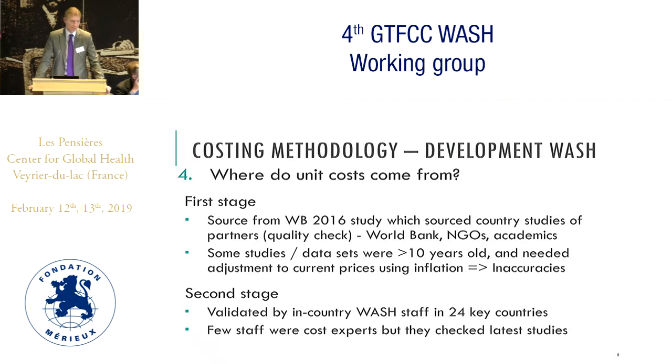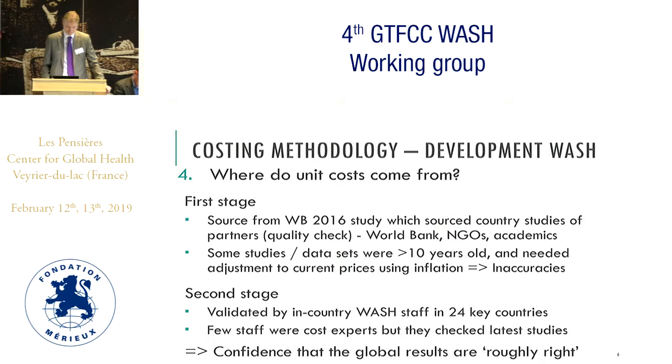In the second stage, for the cholera investment case, we sent these unit cost estimates to 24 key countries. We focused on those countries with the largest numbers so that we had the best data for the overall global numbers. We had responses from 24 out of about 30 countries we contacted. Although the staff were not necessarily economists, they had access to the latest unit cost studies from the countries or benchmark cost studies that governments sometimes have. So they could validate the costs that we were using, and in many cases they proposed adjustments.